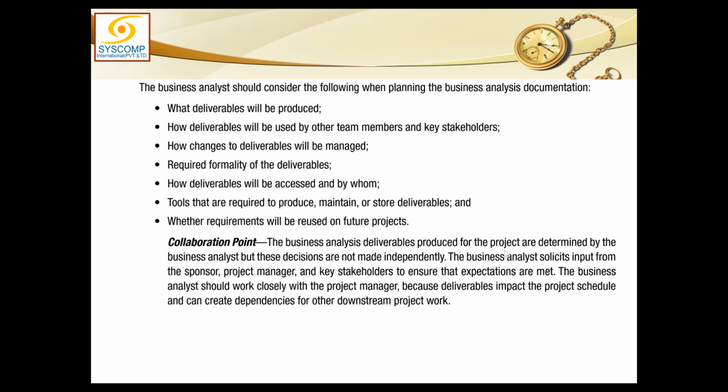Deliverables produced for the project are determined by the business analyst, but these decisions are not made independently. Business analysts solicit input from the sponsor, project manager, and key stakeholders to ensure that expectations are met. The business analyst should work closely with the project manager because deliverables impact the project schedule and can create dependencies of the other downstream project work.